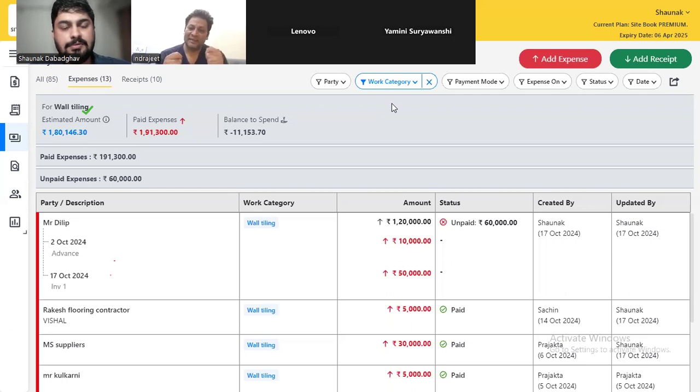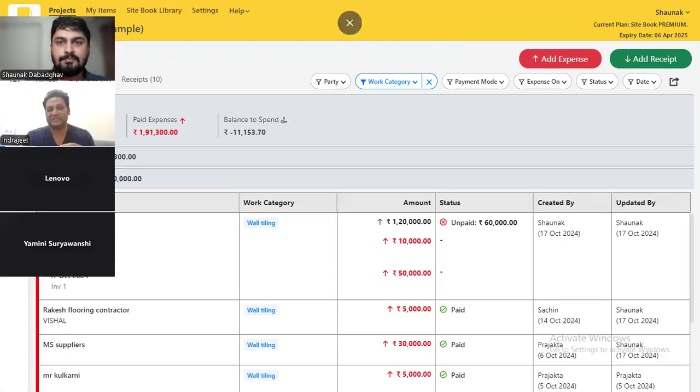And at the time of quotation, you have to hand over a separate list also to your client, that 1,000 square feet of Italian marble is going to be used, my price for it is 350 rupees, and this much amount we have taken in your total quotation or estimate. That separate list is for whatever you think would be controlled by your client during the execution phase, and there could be changes possible at that particular stage. You have to make a separate list.